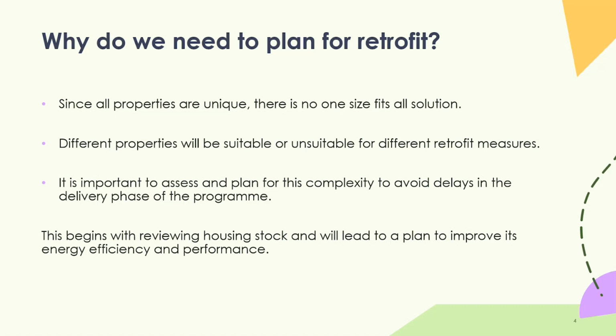Then lastly is thinking about efficiency in terms of delivery. It's really important to assess if you are going to have complex projects to work on and understand what those risk assessments are going to account for. So for example, if you know you're going to have some complex to decarbonise properties in conservation areas, how can you plan ahead to put some of those planning permissions in place or understand the specific design requirements for those properties? That way it will allow for a more effective delivery and help avoid any issues or delays within delivering your programs.